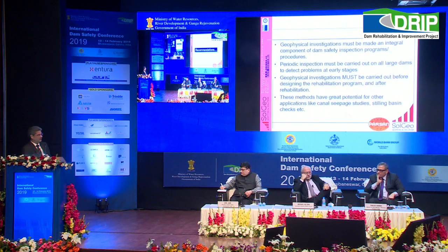I'll straight away come to the recommendations, because my time is up. These geophysical investigations must be made an integral component of dam safety inspection programs and procedures. Periodic inspection must be carried out on all large dams to detect problems at an early stage. Geophysical investigations must be carried out before designing the rehabilitation program and after the rehabilitation. And these methods have great potential for other applications also, like canal seepage studies, stilling basin, etc.